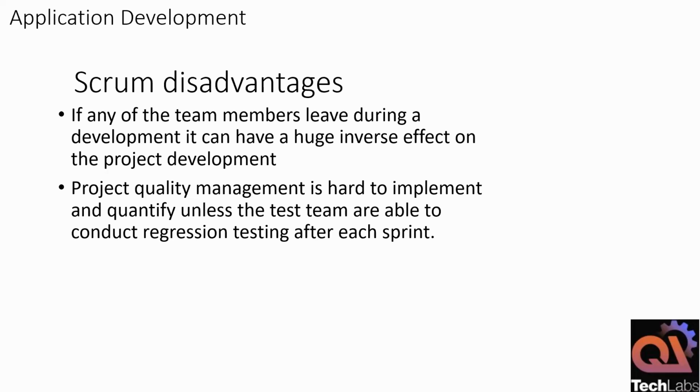And another thing we spoke about, we are working in a time box interval with a fixed team, right? If anybody gives surprises for about 2 or 3 days, there will be an impact on your effort, right? Because you are running a project with a 4-member team. Suddenly, if 2 members go on leave, either planned or unplanned, that will have a huge inverse effect on your entire planning, right? So that's a very important thing over here.